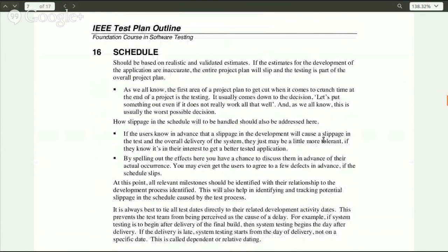decisions. All right, schedule. This schedule should be tied to your high-level schedule. So when you're developing your high-level schedule for your particular project, it is critical that you tie in your test plan schedule with your overall schedule. So if something happens with your test plan, then your final deliverable needs to push out to the right. Right? So make sure you have slack in your schedule in case your test plan is not a go the first time. So you should always expect to have some type of hiccup, right? So create your test plan as tight as you can. And then from other events, if you're able to capture slack, put that slack back in the schedule and move those other events up.